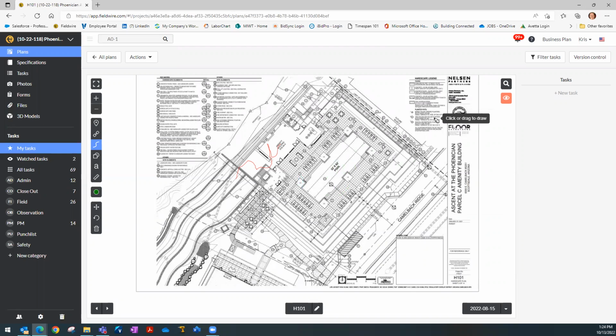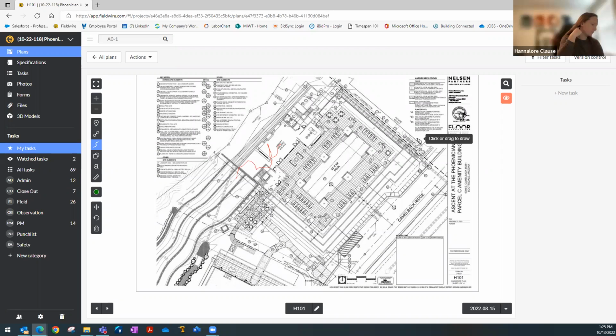Yeah, but Chris, one of the issues with that has been, and I don't even know how this is still possible, but I'm still running into guys who don't know that red is only for as-built. So when we had to clean up the banner phase 1, we couldn't just use that tool to remove certain colors, because we had to go through, see who marked it up, and see if it was actually a red line, or if it was just something someone was trying to note for themselves later. That might be more of an internal thing, like sending out a text blast to every person: do not use red, unless it's your foreman, or you got told to. But Ken and Elena and Jamie and I had to sit for like 2 hours going through every single markup on the printing and removing them, and verify in the field as well. It just took a lot of time.